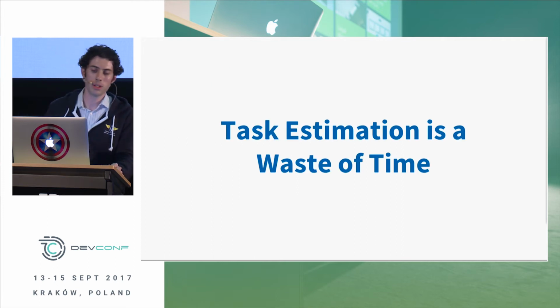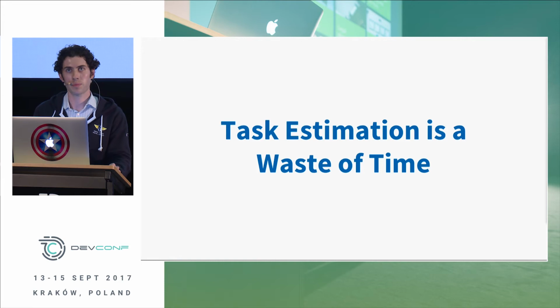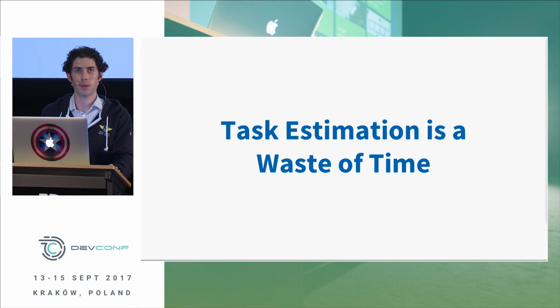On a different note, I believe that task estimation is a waste of time. I was on a team previously where we spent a lot of time with games like planning poker and planning bingo and all that stuff and arguing about whether things were a 2 or 4 or an 8. And one day, someone did an analysis where they found there was basically no correlation between how long we thought a task would take and how long it actually took. So on that day, we stopped doing task estimation, and I have never regretted it in the intervening years.